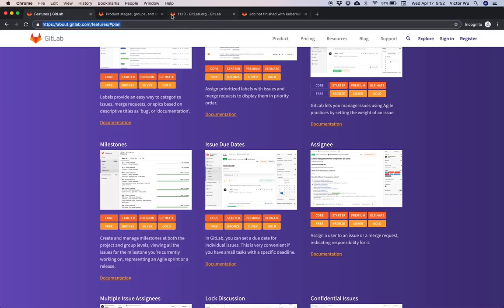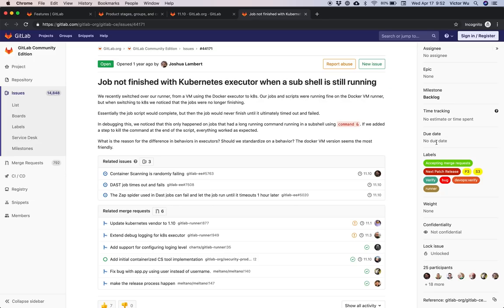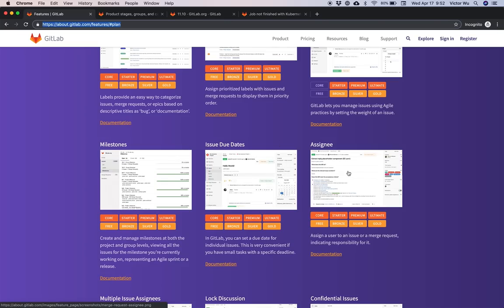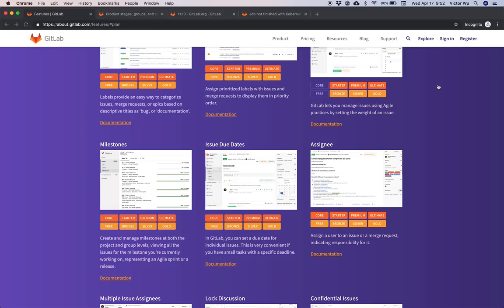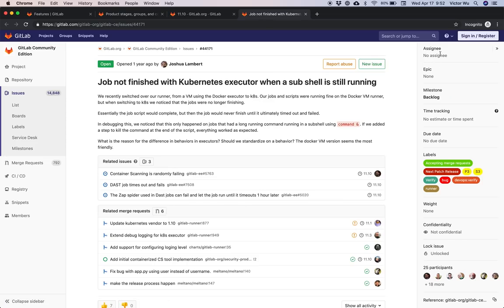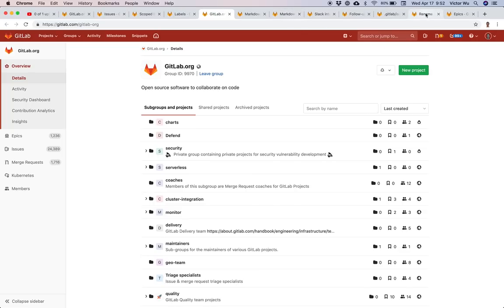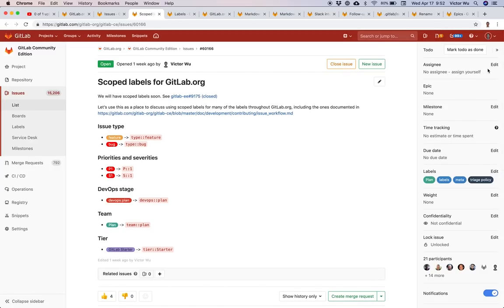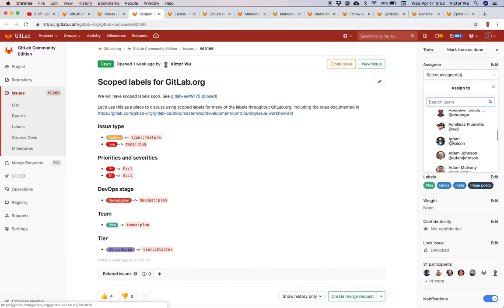Issue due dates — with a particular issue you can associate a due date, and that issue will send you a notification two days prior, with some caveats around notification settings. Assignees — you can have multiple assignees for issues. You can assign multiple people to a single issue.